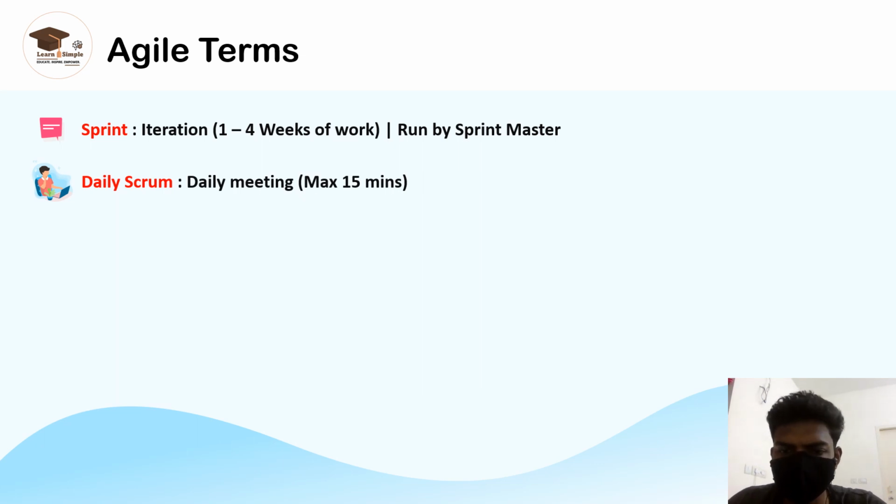Daily Scrum. So daily Scrum is a daily stand-up meeting where the development team comes together and has a chat of a maximum of 15 minutes to define what action items they'll be performing during the daily activity. So in the daily Scrum, it's better to have a very short time frame. And in the daily Scrum, three general questions need to be addressed. One, what actions they have done yesterday, what action items they are planning for today, and is there any support required from the Scrum Master, project manager, or someone to get the work done.